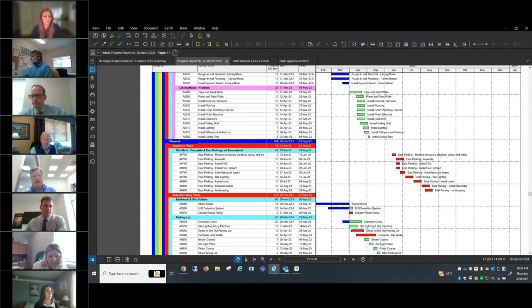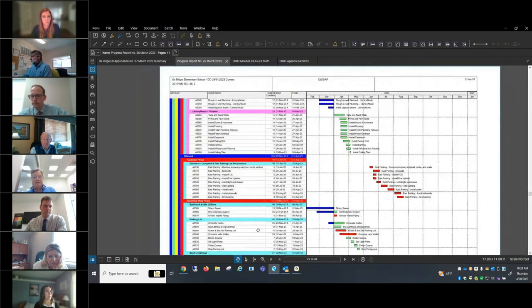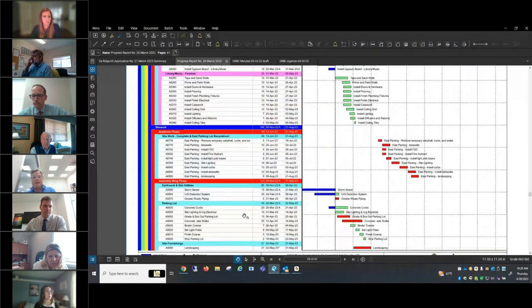Should we have a contingency plan in place in the event we get pouring rain all July and August and this thing gets pushed? You need parking. Well, we'll have this big lot for the assembly. Yeah, but I agree, Rusty. It's on my mind that we'll have that other substantially larger parking section completed. So my worst case scenario thinking would be to make sure that we have a good system in place for managing buses for ELP students, which I think we can do because we're doing it currently on a much smaller scale. So we'll just track that like a hawk and make sure that we have a plan B should we get to the point in time by the 28th, by the time that kids land, that if we need to adjust course there that we can.